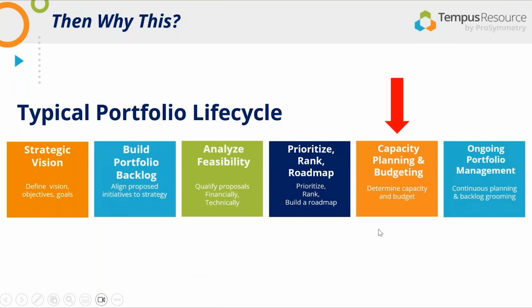I remember consulting with a large financial institution, and they would come up with this all the time. They were talking to me about how for 3 years in a row, their CFO wandered into the PMO and said, you guys are dramatically missing, now for the 3rd year in a row, your CapEx targets. And as we had this discussion, it was because they were essentially committing to a whole bunch of work without ever doing the proper level of capacity planning.